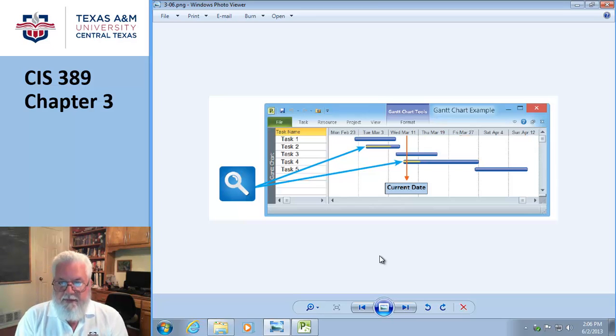Now, a WBS item, in a strange sense, can also be a resource. For example, the crane. The crane is going to appear on the work site for 5 days, and then it's going to leave and go to some other work site. In another scenario that might be more familiar to you, you're putting together a project and you want to schedule the conference room, and you have to look at the schedule and go, oh well, the conference room is a resource that I need for my project.